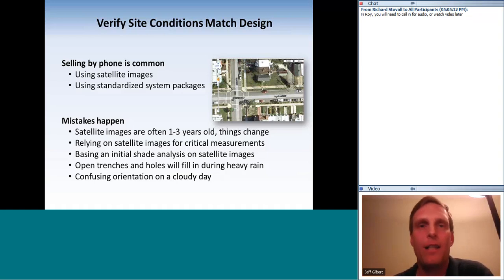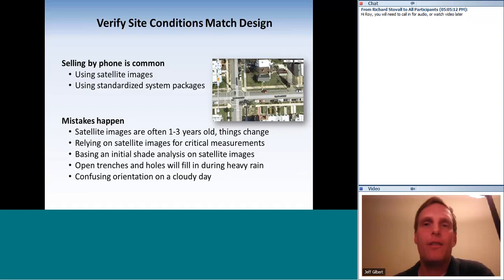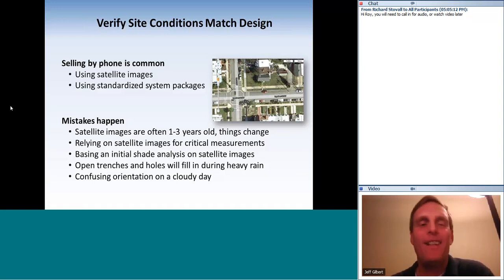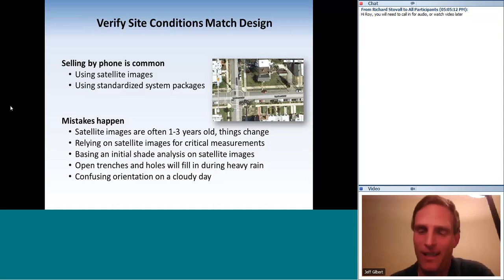Shading may not show up well on a satellite image — trees and shadow lengths in wintertime may be missed. Also from experience, open trenches and holes will fill during heavy rain if a project stretches over days or weeks. One colleague took all the measurements of a roof on a cloudy day but measured the north roof instead of the south roof — fortunately another employee confirmed the correct side on a sunny day.